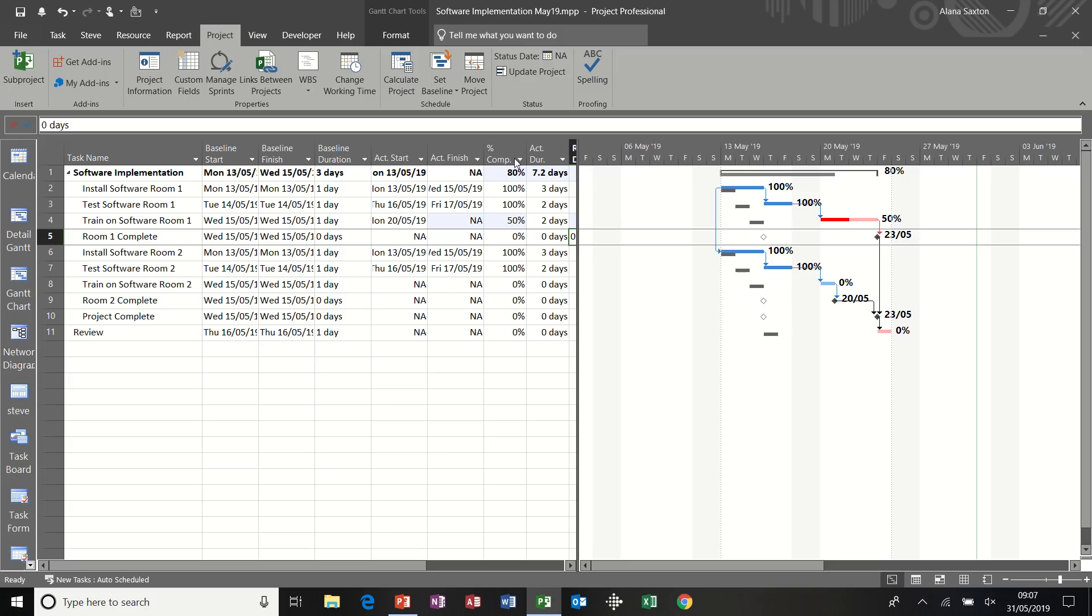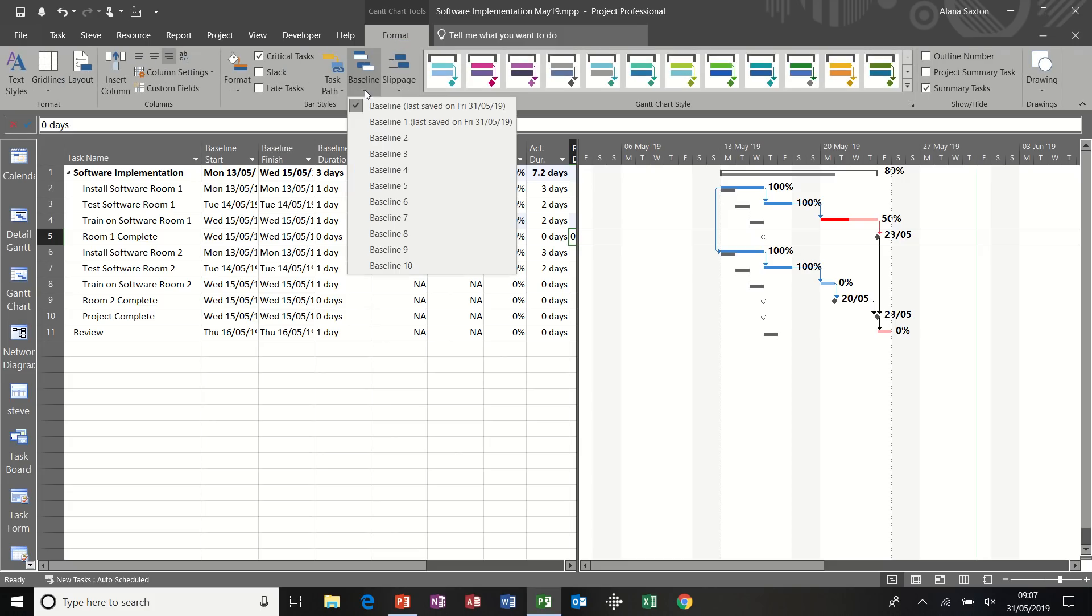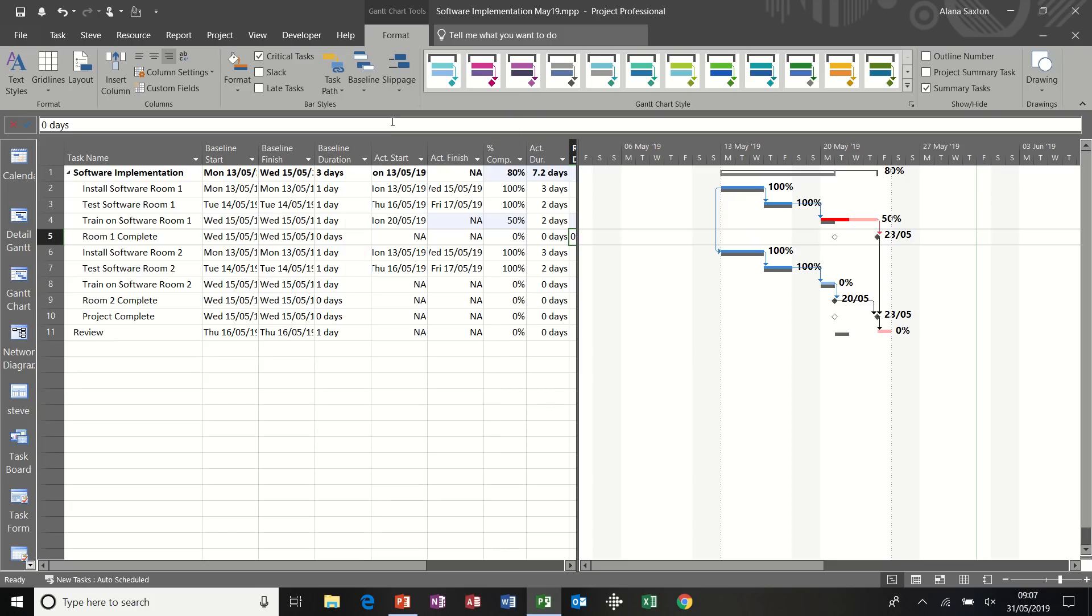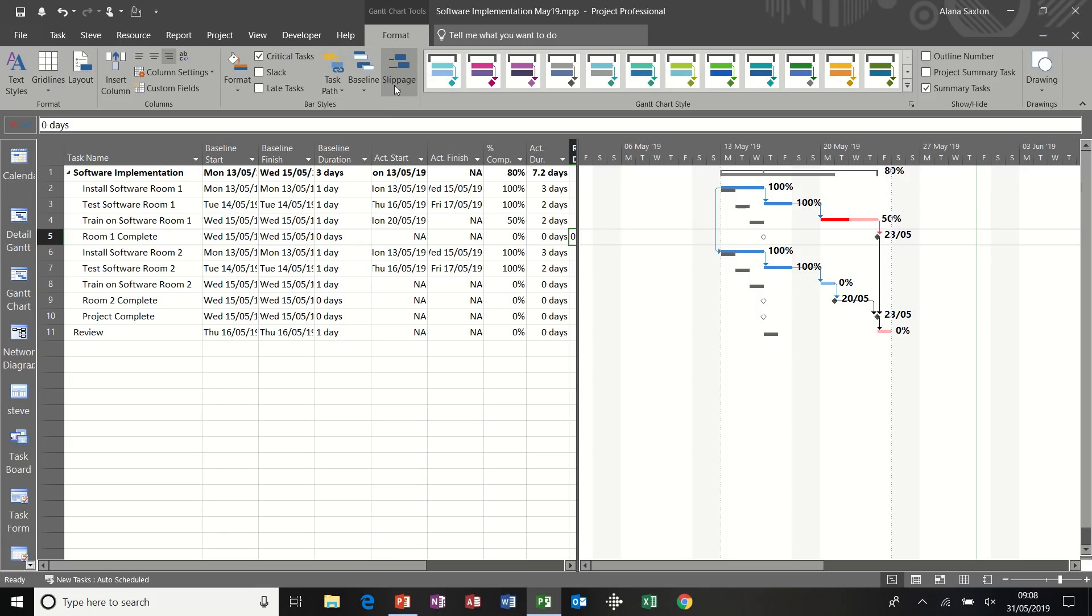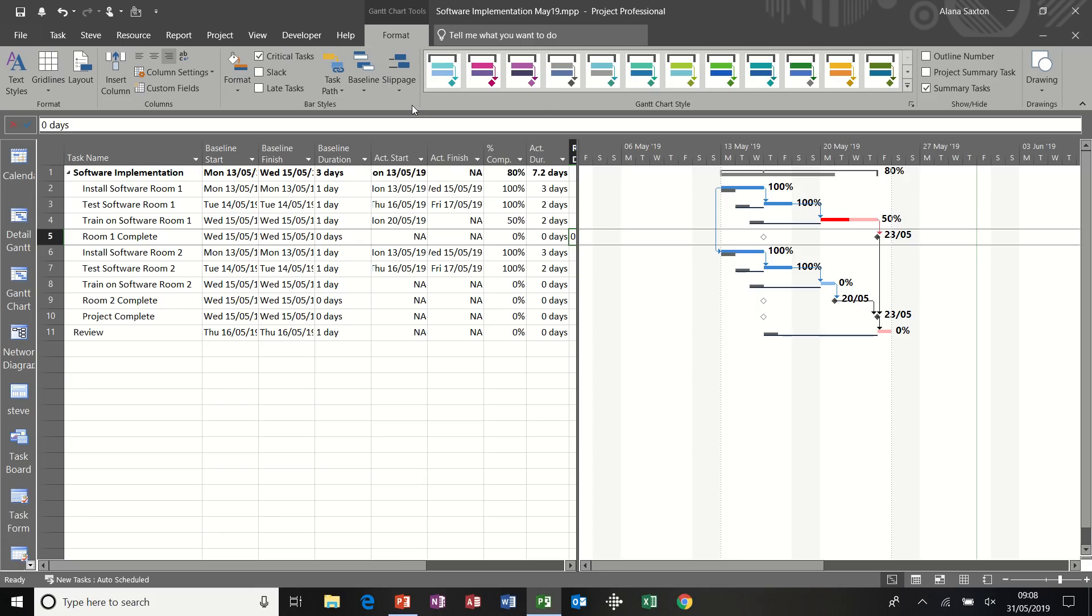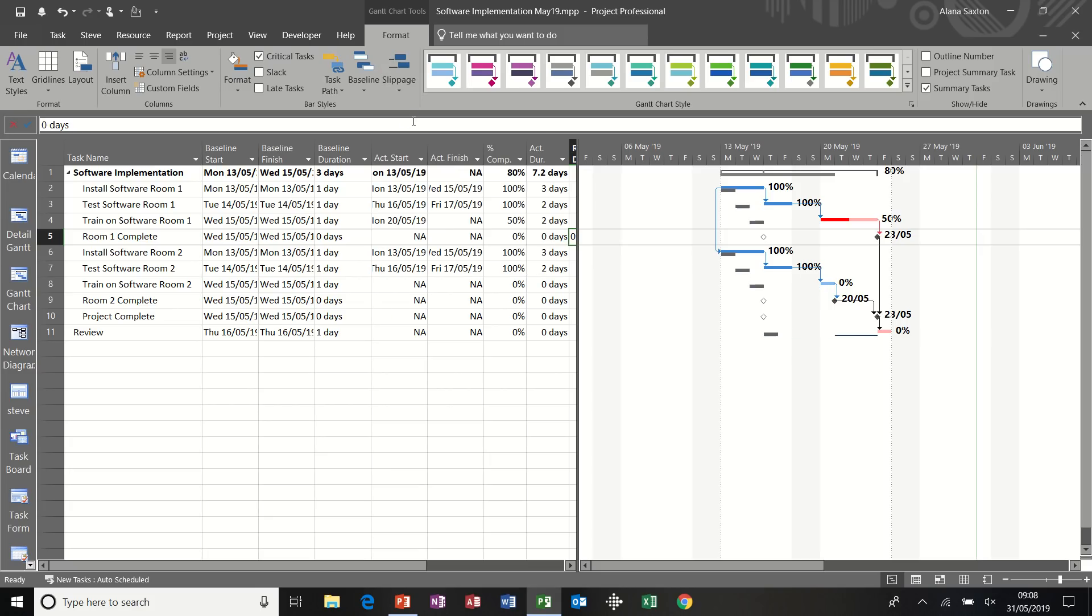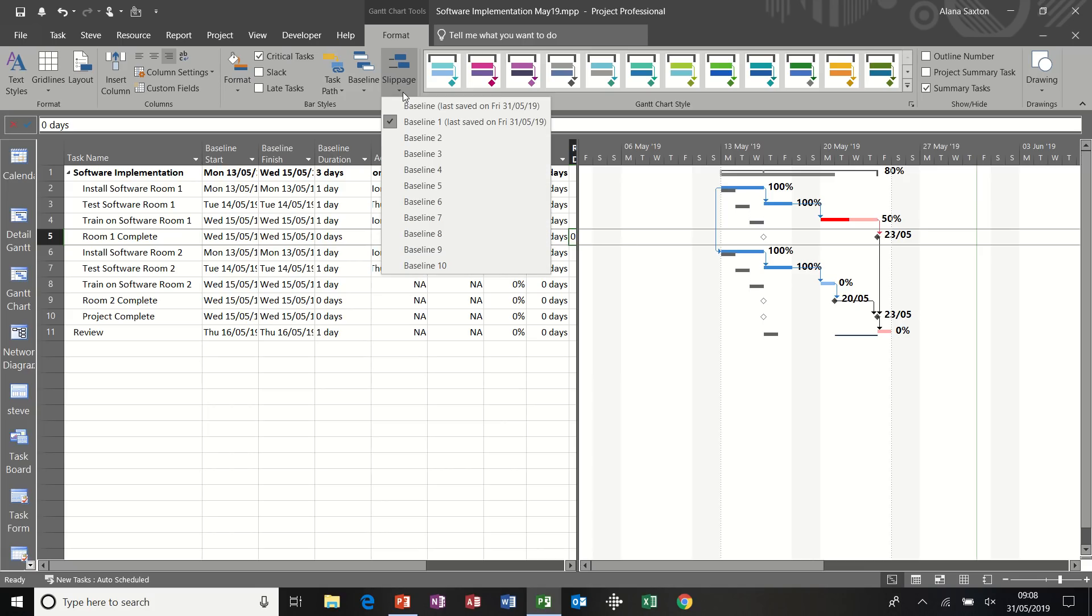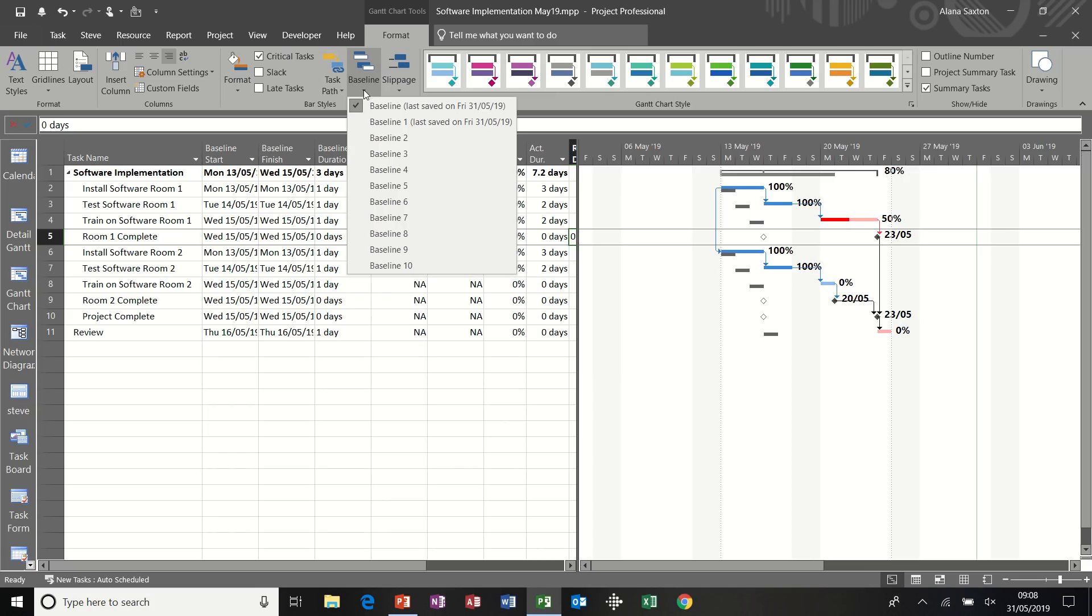So on the format tab, I've got the option to display different baselines. So there's the original baseline, which is displayed. If I click on baseline one, that's showing you the baseline one and the movement from that. Go back to baseline and then same on the slippage baseline. That shows you the slippage baseline one. There's not much there, just that last bit. And you can take those off altogether if you want. I'll leave that one on.